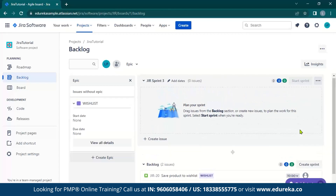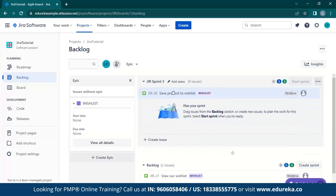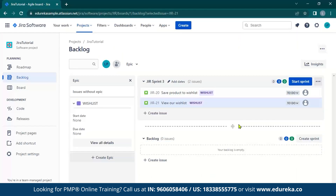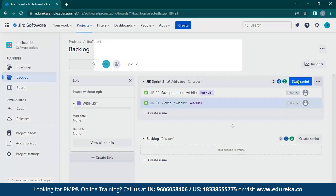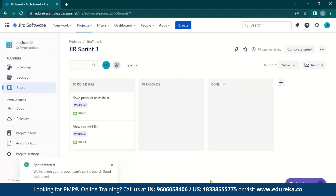The next step is to create a sprint, and this is very simple. All you have to do is drag and drop your stories into the sprint. After you drag and drop your items, you can click on start sprint and it will ask you for details. Over here you can see your sprint name, the duration, start date, etc. For now, I'm going to leave this as is.